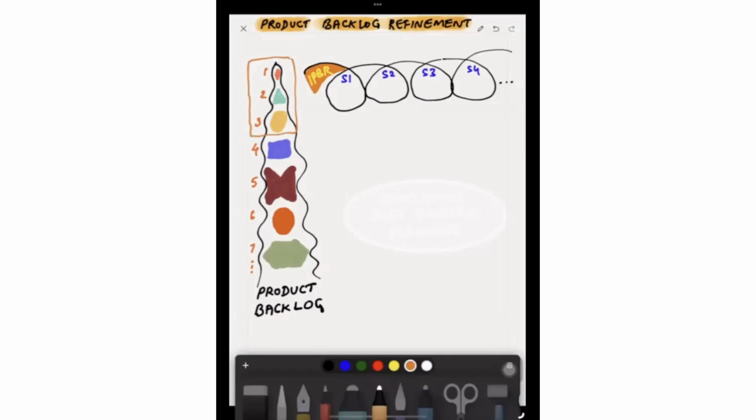Product owner will clarify the doubts of the developers and they identify the dependencies. If the item is too big, they will try to break it into smaller items. High level architecture changes, all these things they discuss, and the developers will provide estimates. Based on all this information, the product owner will decide the order: 1, 2, 3. So they have some items ready for starting sprint 1.